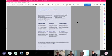Sure. So in the approved scheme 2013, what I adopted was a higher car parking ratio than the municipality requirement, basically to make the scheme more marketable. Car parking is inadequate in my opinion. Well, it's proven as well, inadequate. And the likes of ICD Brookfield have done the same in their own building to make it more marketable. And you have to understand that car parking is a limited resource across the DIFC generally, and the population are still car bound. So what I did was assume a ratio, and from memory it was 38.5 square meters per space, less so for the retail. The retail is only ancillary.